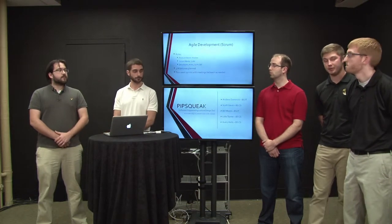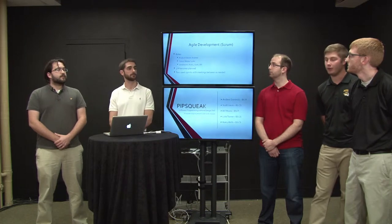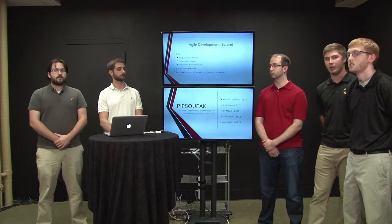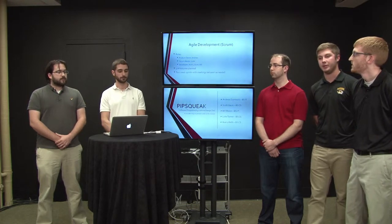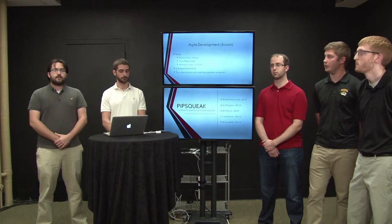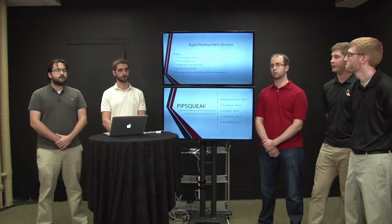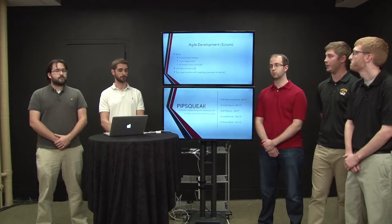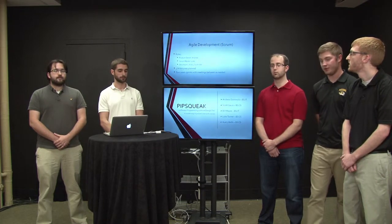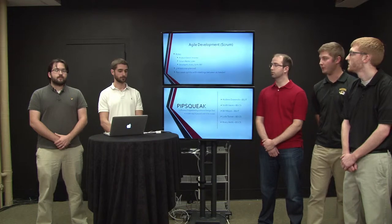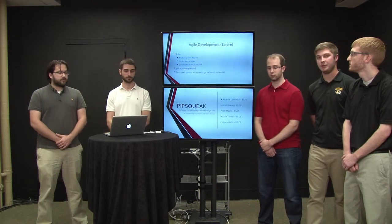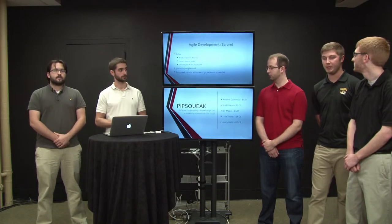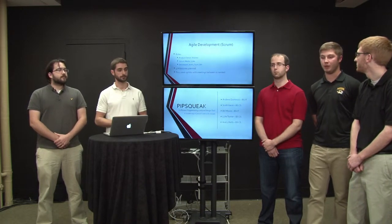As Andrew mentioned, we are going to use the Scrum methodology for our project. We've already used that this semester and it's worked out well, so we'll continue next semester. We're all familiar with it and comfortable using it. Our Scrum roles will be: Andrew as product owner, Luke as Scrum master, and Scott and Bill as developers. For the second semester, we have five milestones planned and we'll be doing two-week sprints with meetings in between to check progress.